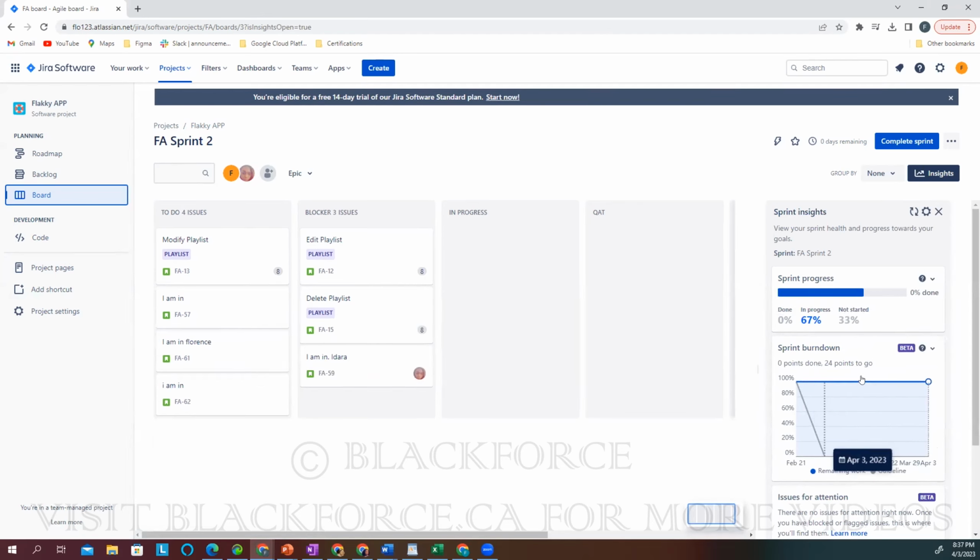Yes. The Scrum Master will put this in the review when you are doing sprint review. When you are doing sprint retrospective, it will be a form of discussion, right? So for example, if you notice in the burn down chart that on day 4, day 5, day 6 nothing was done, you can now have the discussion. What was happening? Why were things like that? You can use it to have a discussion with the team, right?